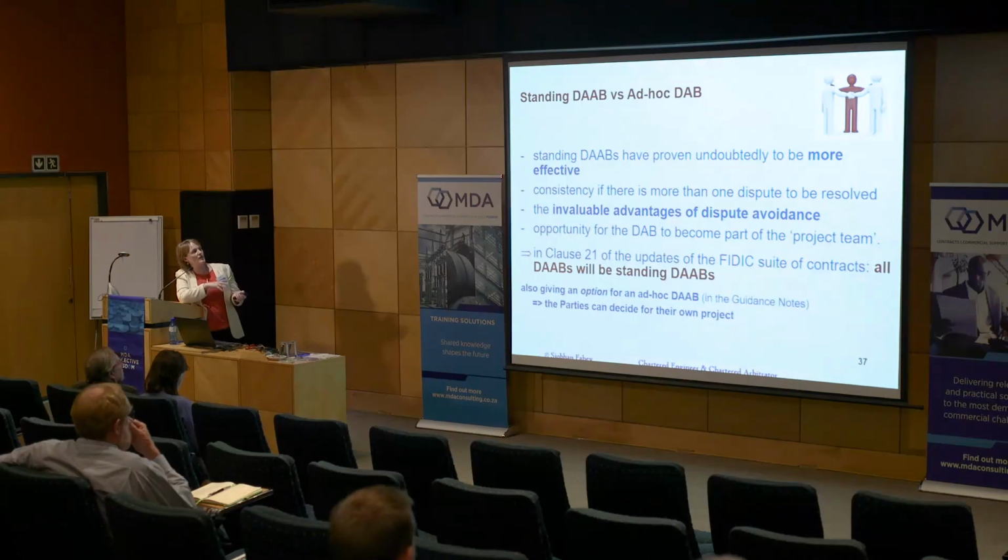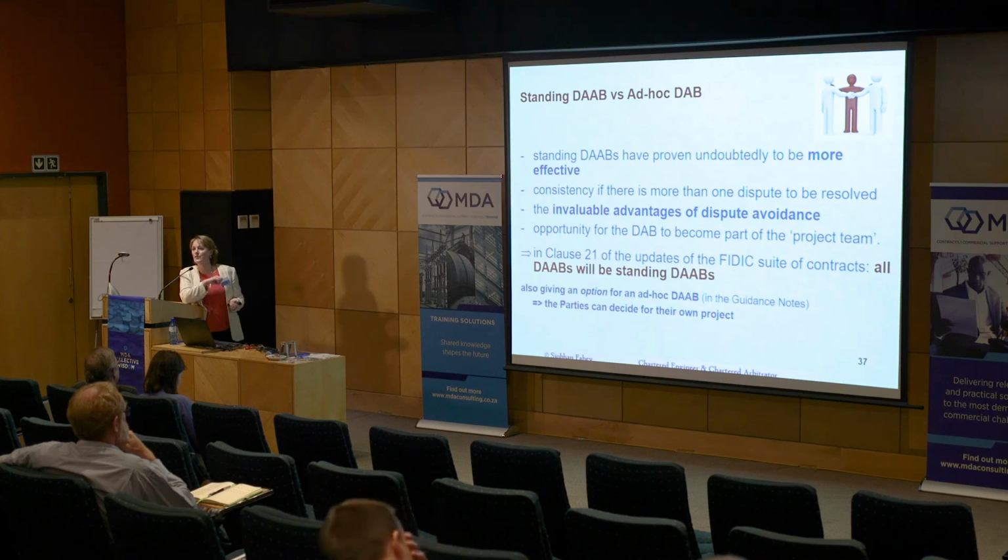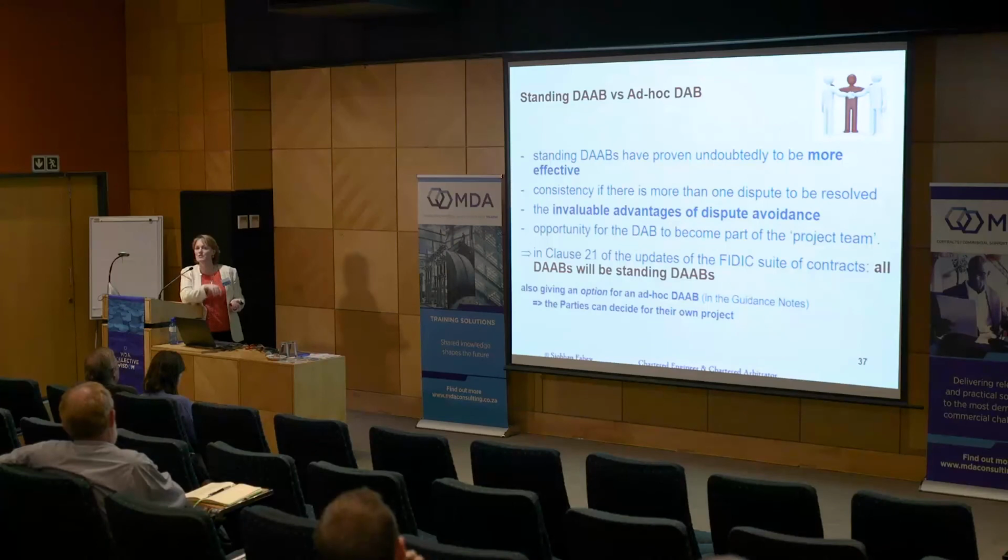This question of a standing DAB versus an ad hoc DAB has already been decided. The default is standing DAB, but there will be provision in the guidance notes if the parties or the employer want to have an ad hoc DAB.